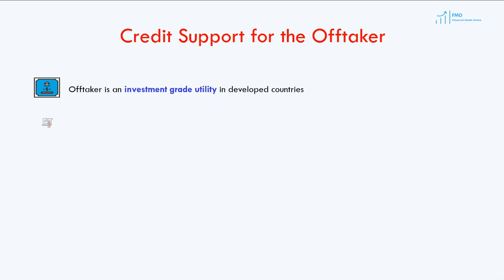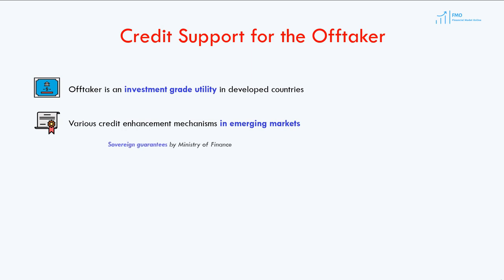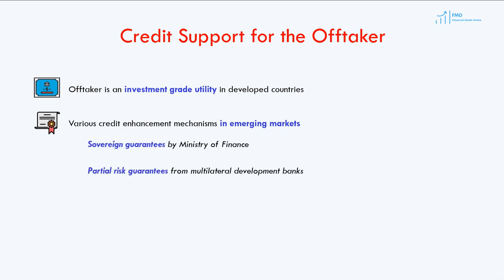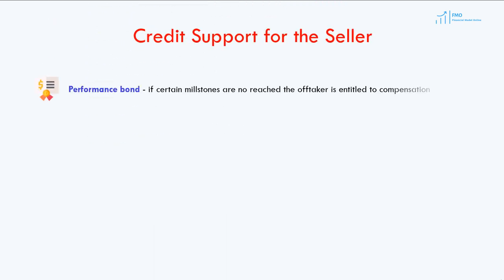For the off-taker in emerging markets, various credit-enhancing mechanisms may be available, such as sovereign guarantees from the government, partial risk guarantees, and political risk insurance. The energy seller is required to post a performance bond to enhance its creditworthiness, which comes, typically, in the form of letters of credit or bank guarantees.